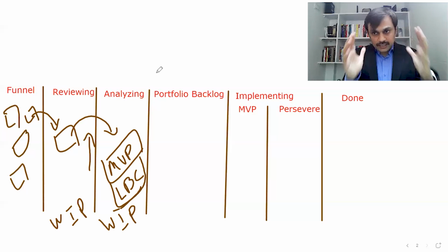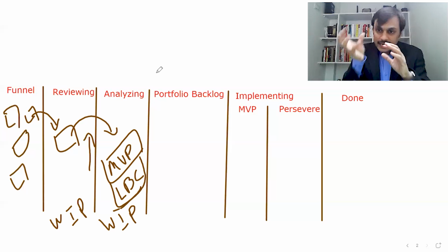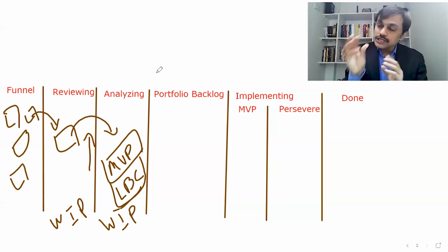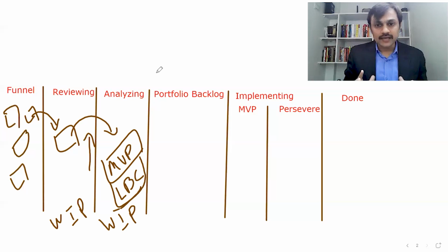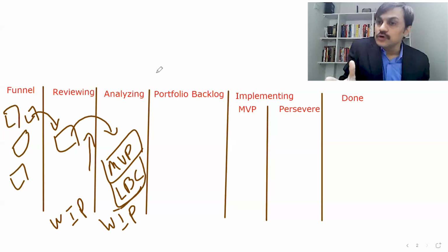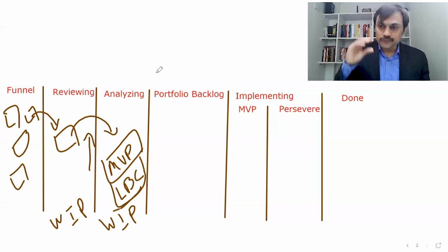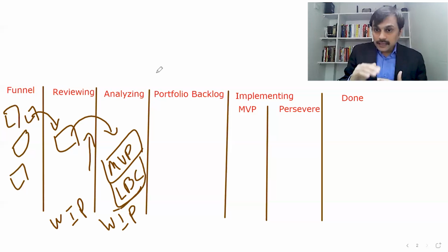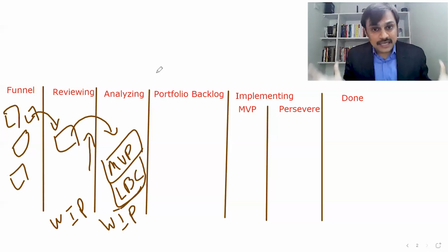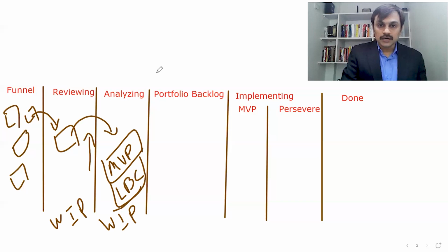Yeah. So if I have a big initiative, I want to identify the smallest piece. And in the lean business case, I need to estimate the cost related to the small piece as well as the big piece. So when the stakeholders are looking at it, they also know how long or how much investment we have to make before we know more about the feasibility of this particular business idea, or the reality of it, or some level of data should be coming in. The amount of money you spend on the MVP is also a decision-making point, because if the MVP itself is very costly, the stakeholder might be a little concerned about that particular initiative.